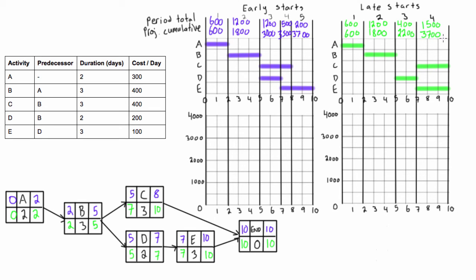Now we'll graph the project S curves — one for early starts, one for late starts — then combine them for comparison. For the early starts: end of period one is at about $600, end of period two at $1,800, end of period three at $3,000, end of period four at $3,500, and we finish at $3,700. Connecting the dots gives us a nice project S curve for cumulative costs based on early starts.